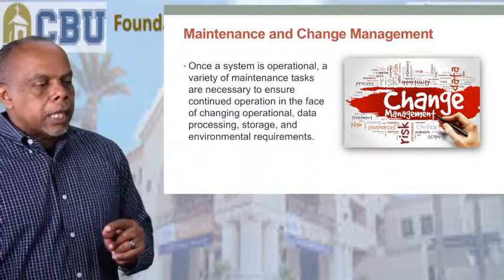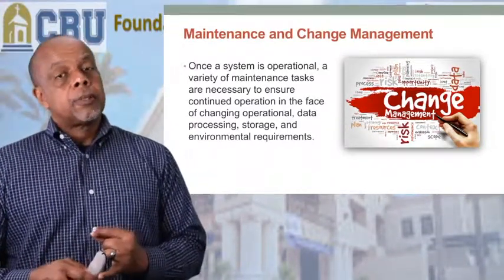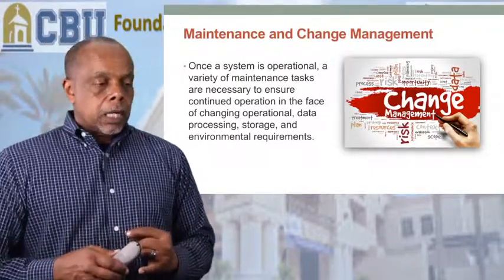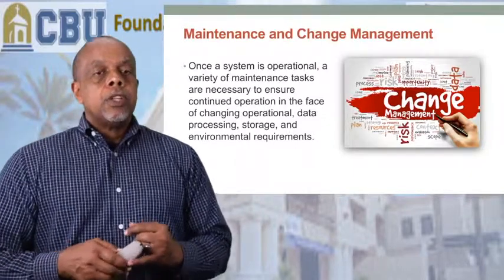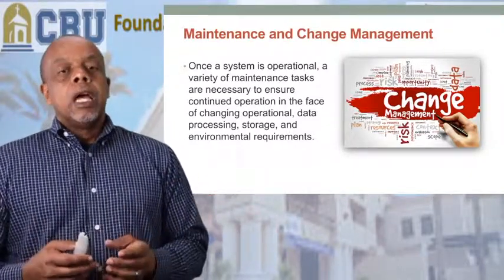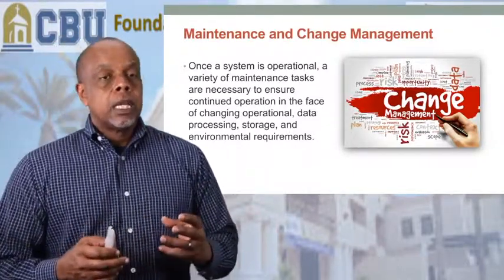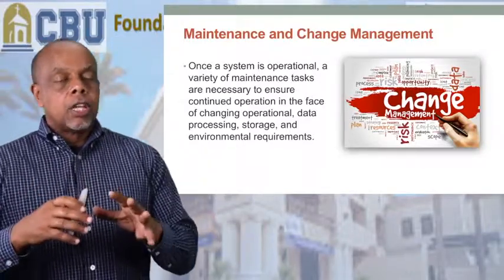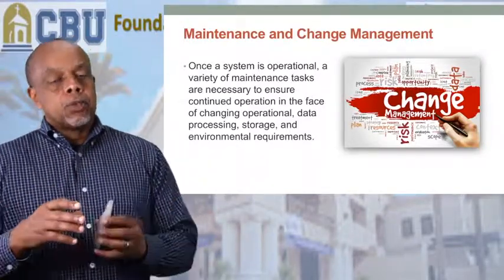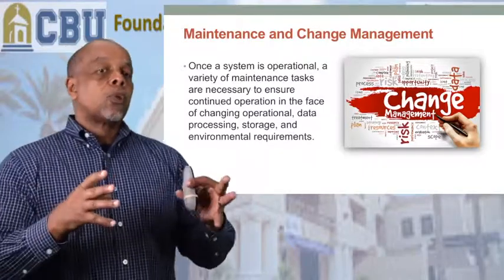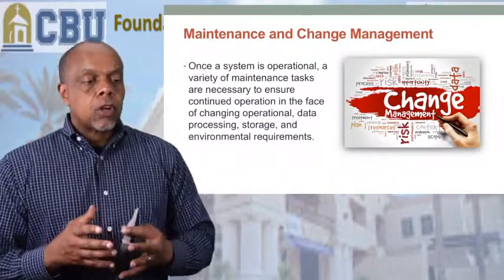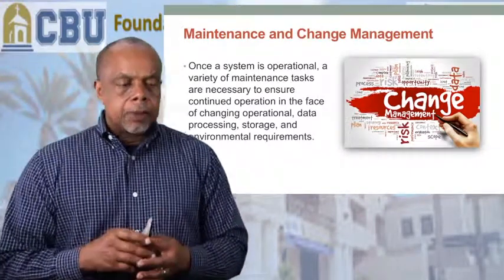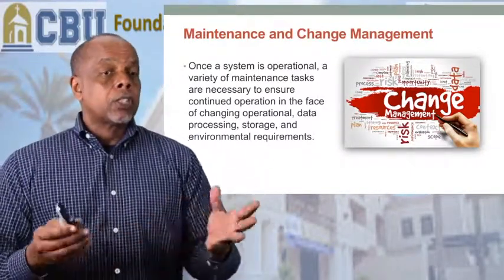very rigorous, but it's very important that you have some type of configuration management, a CCB, a configuration control board. You need some type of configuration control and management process, so that you can track when changes come in, how changes are made, and be sure a change here doesn't disrupt something else over here. So you can look at how your software is being updated in a post-production and pre-production environment.